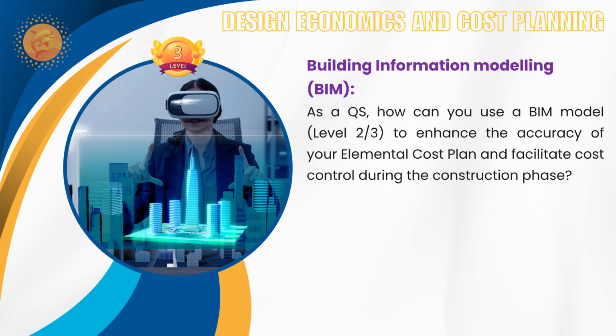Adding cost data, 5D allows automated quantity extraction, QTO, quantity takeoff, from the model itself, like concrete volume, wall area. This is faster and reduces human error. Although you have to do a manual check to confirm it goes with your benchmark data, if something is abnormal, you have to identify and see the root cause.